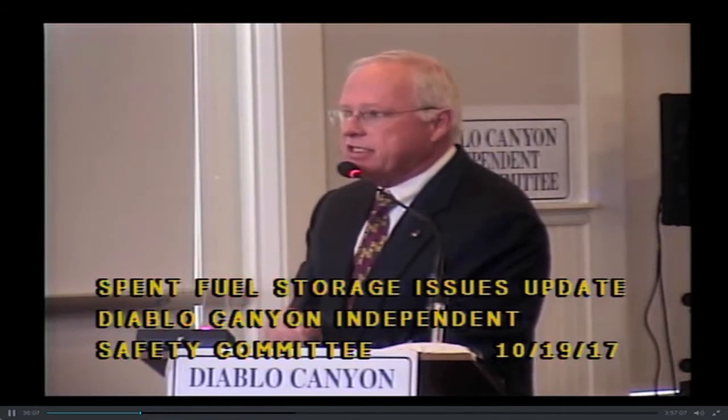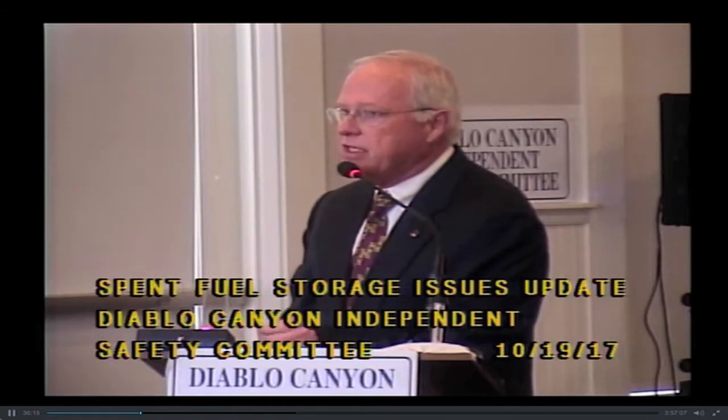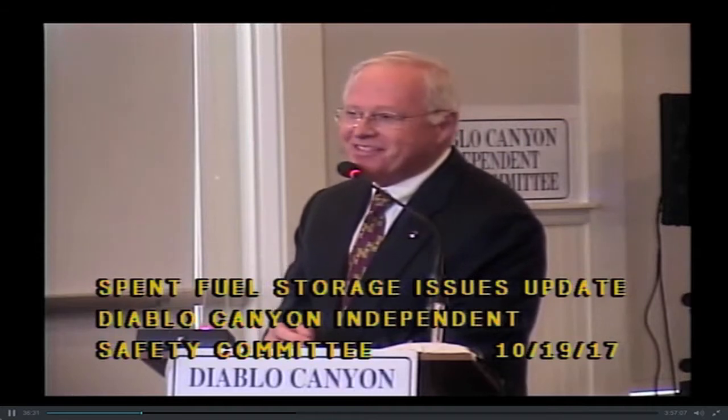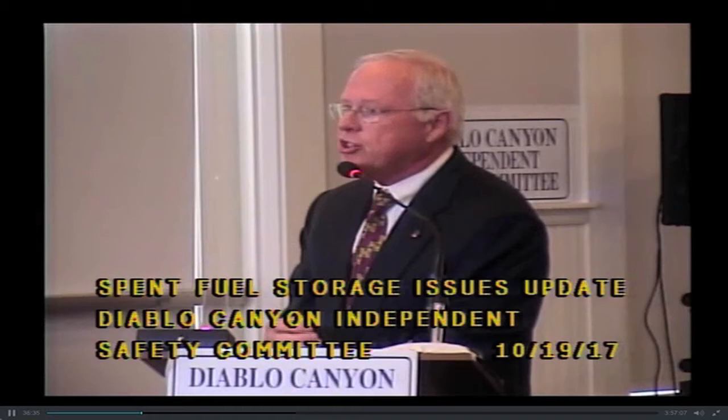ISFSI licensing is different from power plant licensing, in that for a nuclear power plant, the initial license is for 40 years. For an ISFSI, it's 20 years, and then the relicense is for a 40-year period. So that means our license for Diablo Canyon expires in 2024 for the ISFSI, and it's going to be important to start that relicensing process soon.